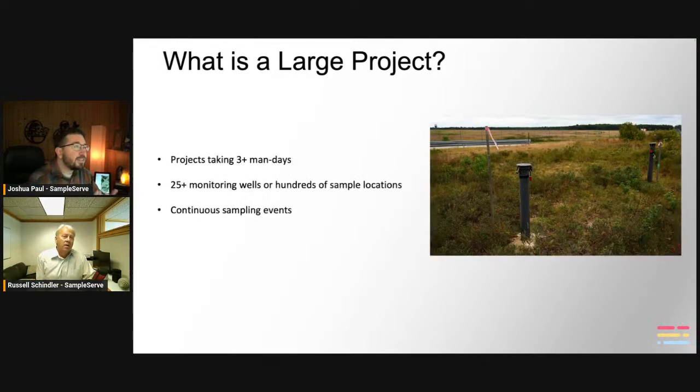So Russell, what do you think is a large project in your mind? I know you've been out in the field a lot in your day and you've seen them all. So what do you think is a large one? The way I describe a large project is where you're going to be spending 3 or more days. That could be 3 people doing it in one day or one person over 3 days. Typically that's going to be 25 monitoring wells or more. We've done some huge projects, but 3 man days, it's one person on site for a day. If you got 10 people on site for 10 days, it's 100 man days.